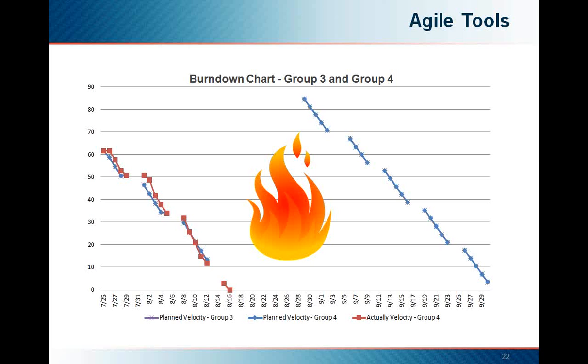Any additional items, such as the items on the blue post-it notes, will add to the effort and be reflected appropriately. Okay, so before the burn-down chart kind of burns up, what's the difference between the red and the blue marks that we see here? Well, actually what you see are 2 sprints. The blue lines indicate the planned effort, and the red line actually shows the actual progress.